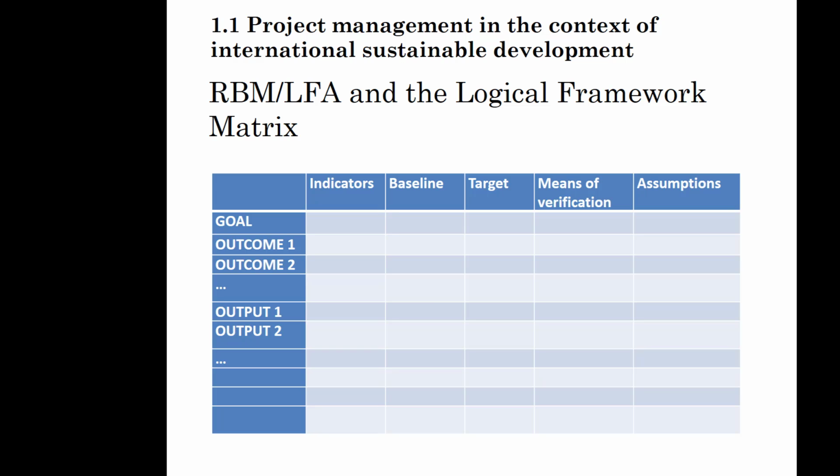They were much more intended to summarize an in-depth participation or discussion with project stakeholders about the goals and the strategy of the project. The assumptions column was originally made in this sense, and the intention was that it should be used to analyze the external dependencies that would influence the program's effectiveness. So the program team had to decide whether or not to directly address or mitigate these factors, these risks of the project.